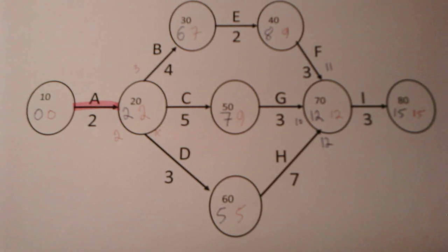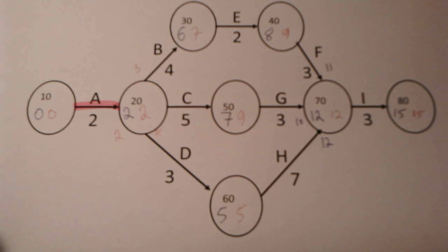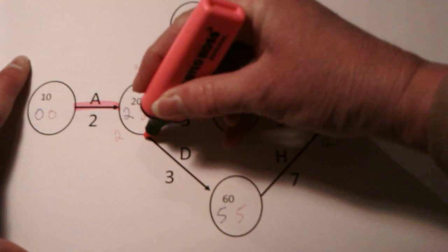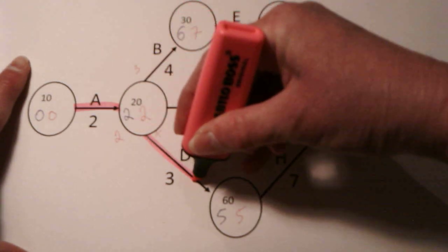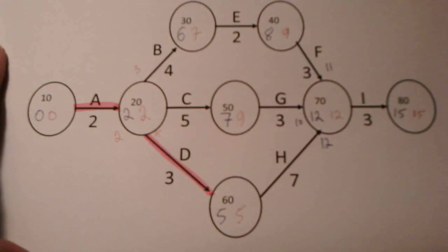We now look at the final path through the bottom part of the diagram, and the earliest and latest event time for activity D are both 2. So there is no spare time here, so activity D is on the critical path, and we highlight that arrow.